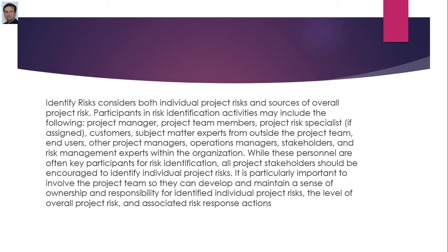While these persons are not often key participants for risk identification, all project stakeholders should be encouraged to identify individual project risk. It is particularly important to involve the project team so they can develop and maintain a sense of ownership and responsibility for the identified individual project risk, the level of overall project risk, and associated risk response actions.